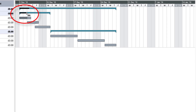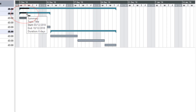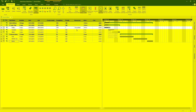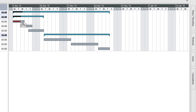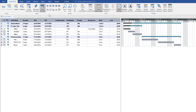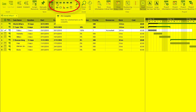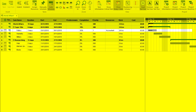If I zoom in, you can see these little black option lines — these are for completion. Go to politics and I can drag along to show 70% completion — I added that earlier. You can hold the left button and drag it along to show progress as you go. Notice that world affairs and topic title move with it, because they are dependent on the actual tasks you're doing. To make life easier, come to the top where you have quick options to set 0%, 25%, 50%, 75%, or 100% complete.